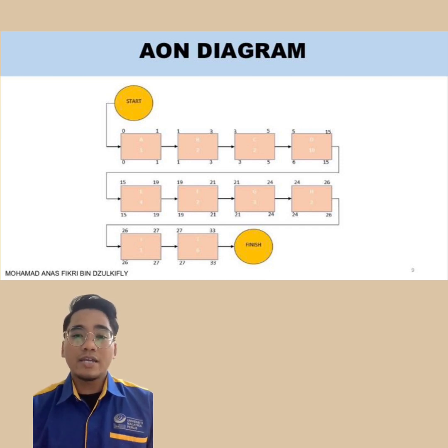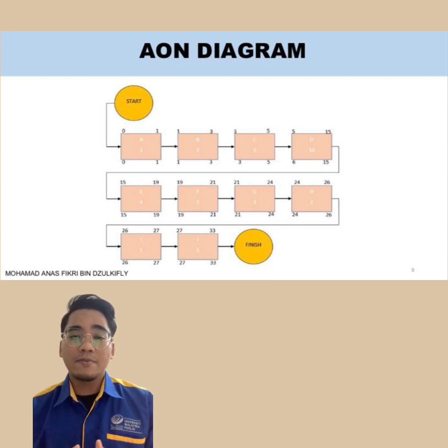The activity on the AON diagram begins with a review of the building and goes on to data collection, next cross-checking the load demand data, determining the renovation plan, analysis and identification of energy conservation measures, estimating the cost of renovation and calculating the return on investment. The final step is preparing the audit report. Overall, the entire process takes approximately 36 days to complete. Based on this, if the project starts on 1st January, the estimated finish date will be February 7th.